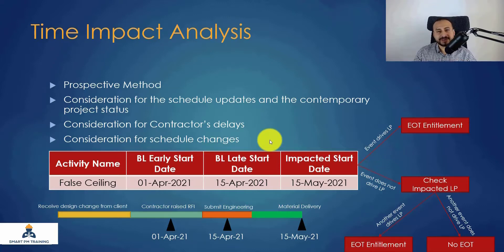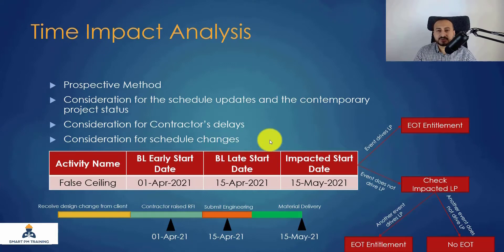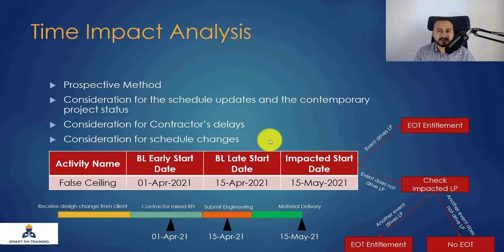You need to maintain practical sequence, so there are changes in the program. With the Impacted as Planned method I am using the same baseline schedule with the same assumptions — even though the work sequence on site may change. But for the Time Impact Analysis, I am using the schedule update, and when I developed and submitted that update I incorporated some practical work into the schedule changes.